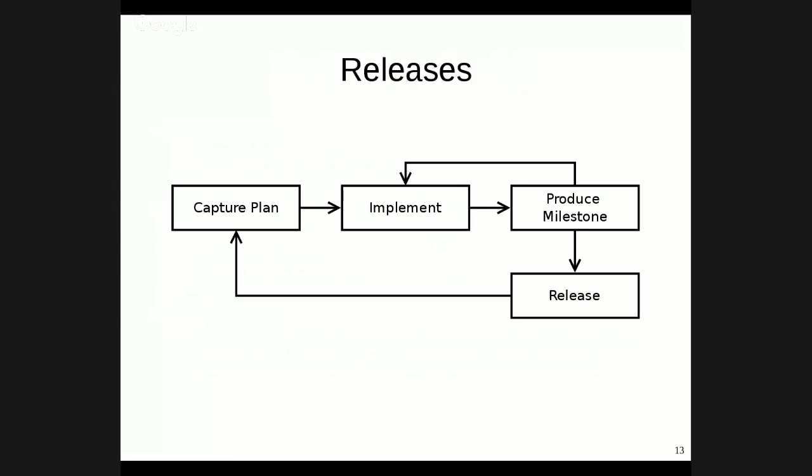We actually have a system, we call it the PMI, which I'll talk briefly about in a minute, that allows you to capture information about your releases. My strong preference is that a project team at the beginning of their release cycle create a release record in the PMI for their project that describes, in very concise terms, a couple of sentences, what your plan is. So have a description on your release and a target date. Again, if somebody shows up to your project, they have a fighting chance of understanding what you're doing.